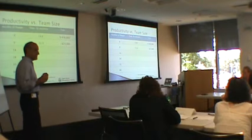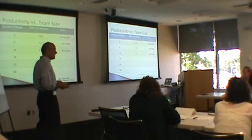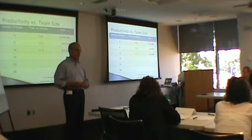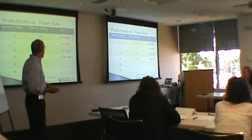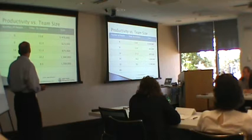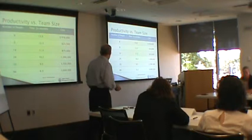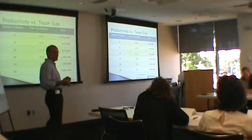As a Product Owner wanting it faster, what if you double the team size to 14? You get a little bit faster — maybe another month off. Still not good enough. Four times as many people? Ten months. Five times as many people? Nine months. Eleven times as many people? Then you get it done in about half the time. You can see there's a total disparity — growing people in the process doesn't scale linearly. That's why three to nine is the sweet spot.